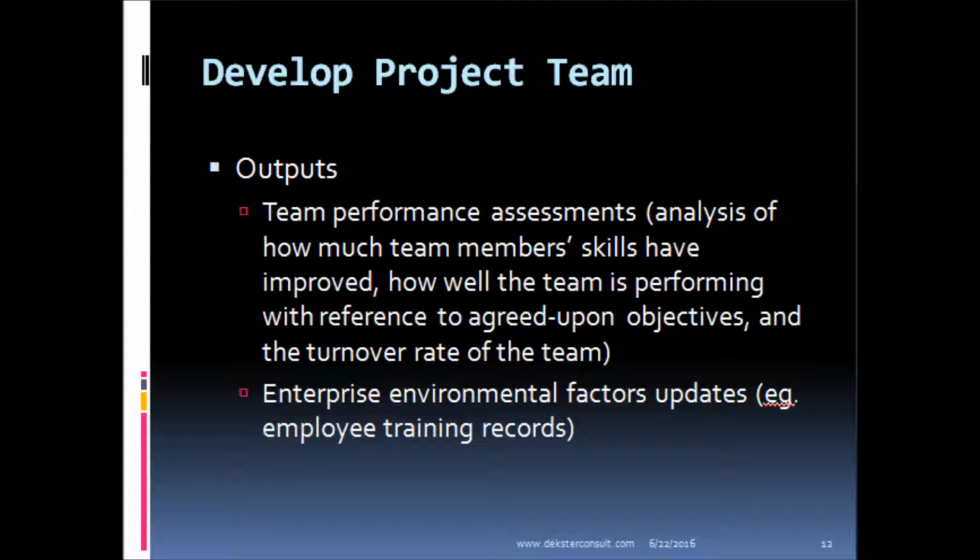The outputs of the developed project team will include team performance assessments, which will analyze how much team members' skills have improved, how well the team is performing with reference to agreed upon objectives, and the turnover rate of the team.